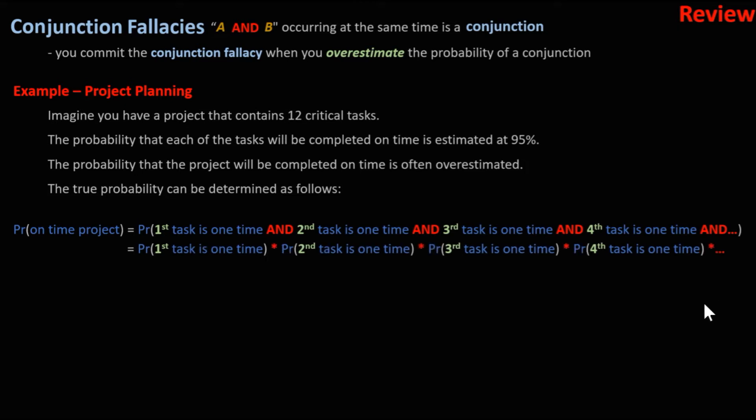Using the AND rule, we have to multiply these probabilities. So this becomes the probability that the first one is on time multiplied by the probability of the second one and so on. We can substitute in our 0.95.